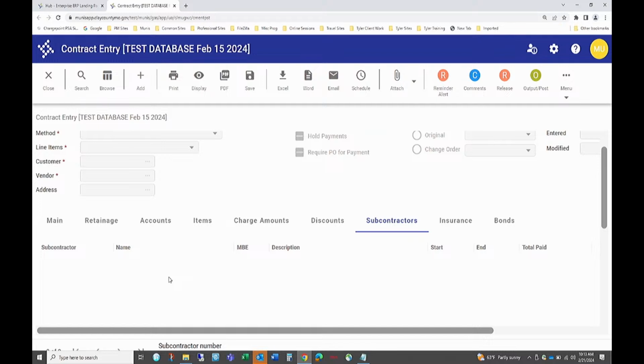And then, if you have certain federal contracts or even grants where you have to track and maintain proof that you're paying 25% of that contract, maybe it's ARPA money that has to be spent on certain MBE type vendors, you could track them in here to prove, if you get audited, these are the payments that were made to qualified MBEs to satisfy the terms of the government money paying this contract.